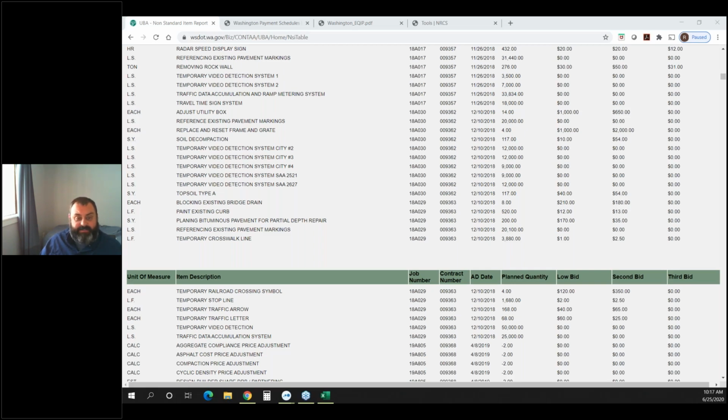And so the other component is getting out early. If you're going to build something in the summer, contact the contractor early, whether it's the landowner, or you, or whoever's running the contract. If you call them in June looking for a July construction, they're going to be higher cost than if you call them in February to say, hey, we're not going to build it until June, so they can build out their schedule. They like that predictability, I think. So yeah, there's a lot of things that factor into prices when dealing with contractors specifically.